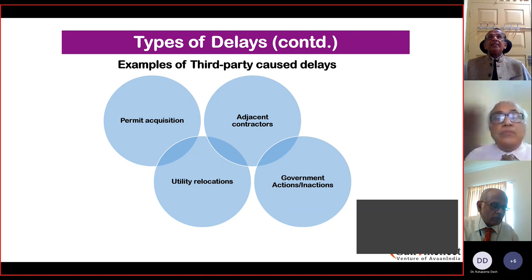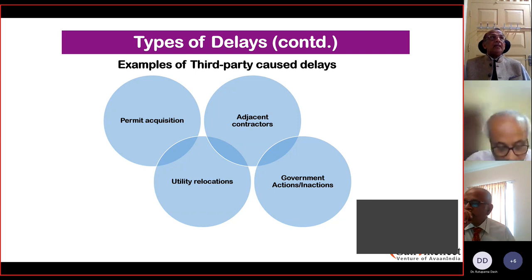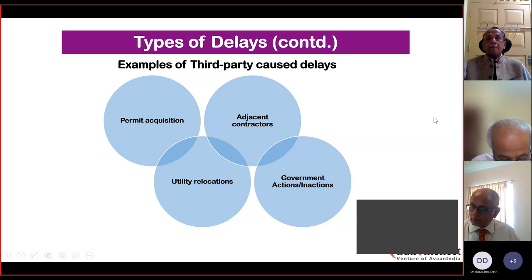When a feasibility study is provided before even starting the tender, you narrate in the feasibility study how many equipments you have, what type of equipment, which year, all these details you have to give, how much manpower you have available, and details about the management. And then at the same time, you have to give projections based on if the contract is awarded, what additional equipments, manpower, or managerial persons you will avail for the contract and within what time frame. All these things have to be put in black and white, and it's a commitment.